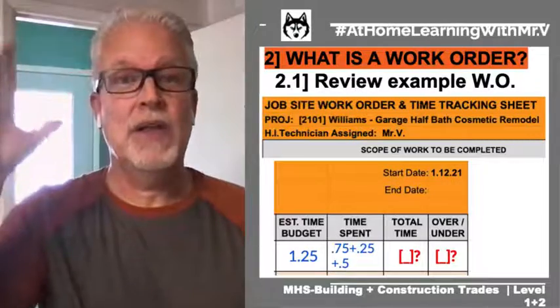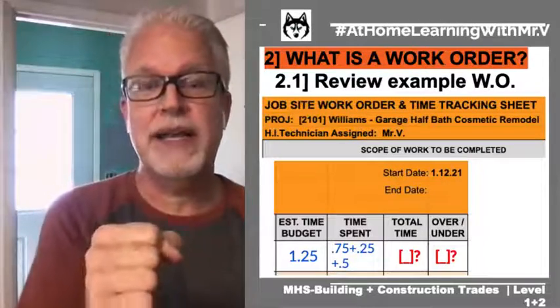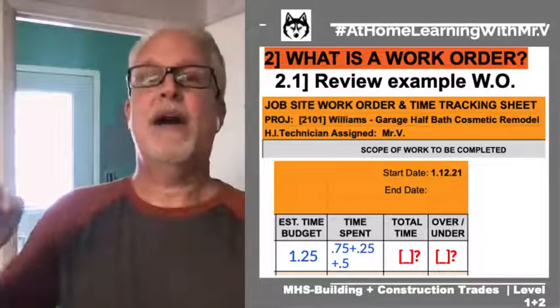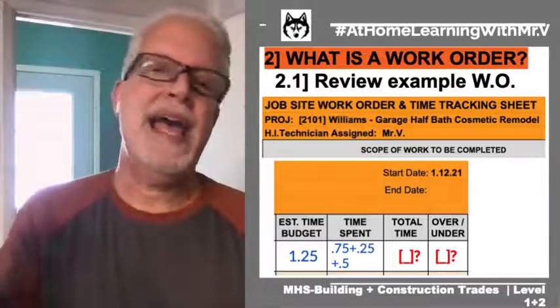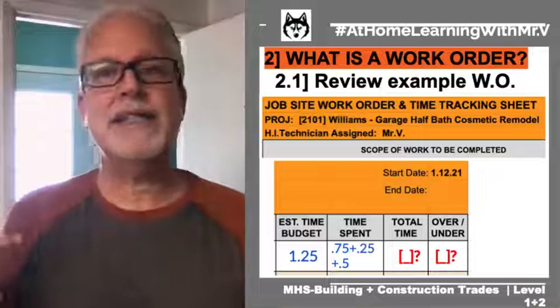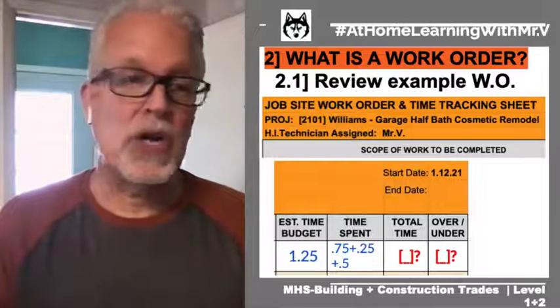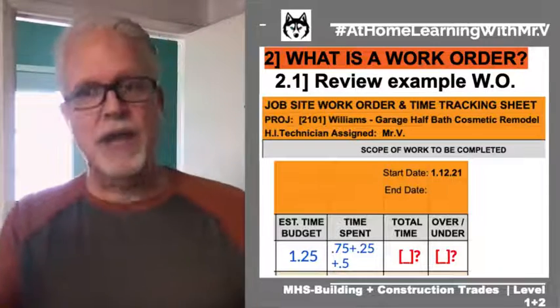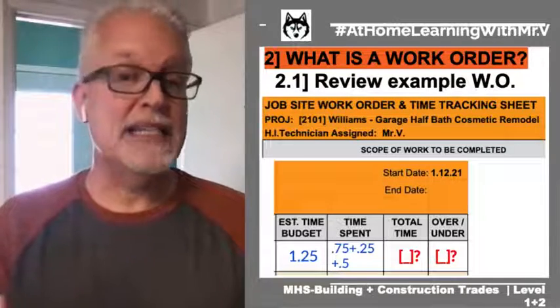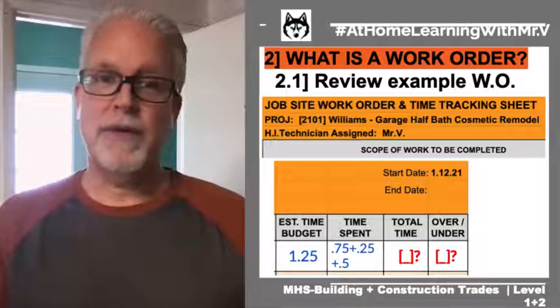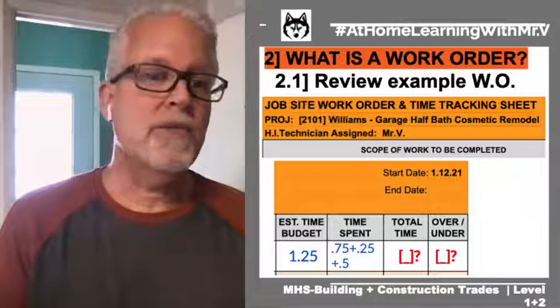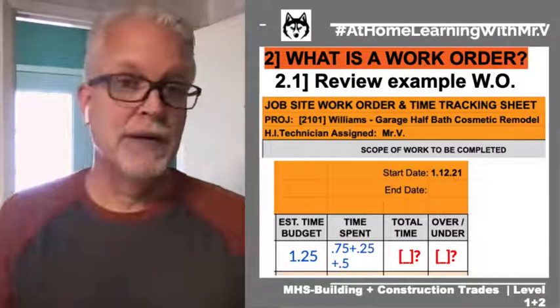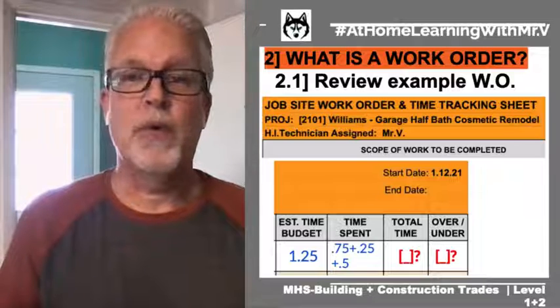It's going to give us all the descriptions that you just saw in your assignment and that are on the contract and that are in the estimate that the client signed off on and I signed off on. That's now the go-to for the whole project, okay? But we're also going to add some columns and we're going to be tracking the time so that we know if our estimate was accurate or if we are over or under the time that we allowed for each of these